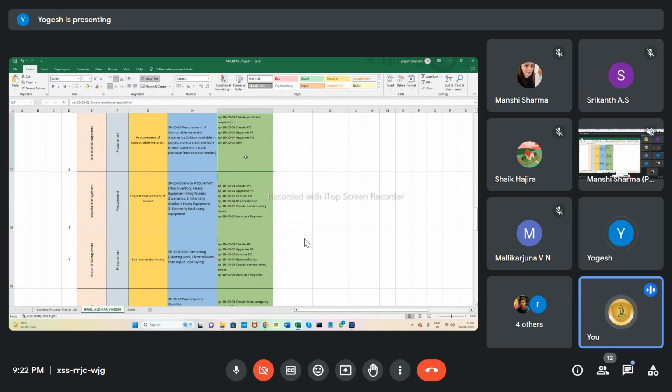You have to design your process in such a way that there is purchase requisition creation in the project site, approval, and again purchase order approval. Then it goes to delivery. The outbound delivery will be created under the central warehouse. That process you can show as a flow diagram during the fit gap analysis. You can write that down. So this is the case 2 process.